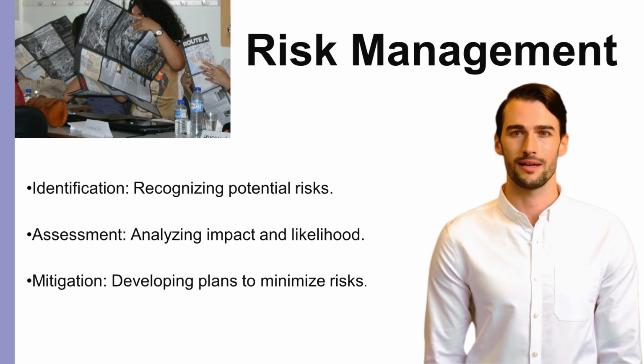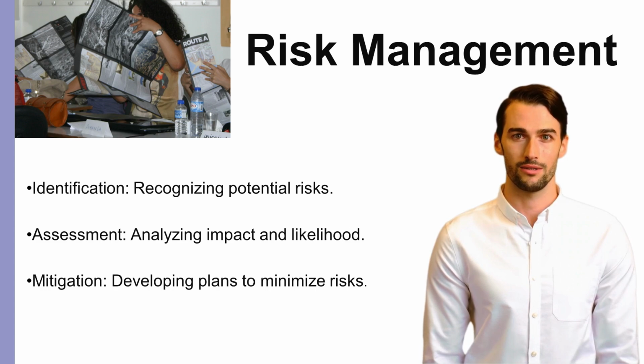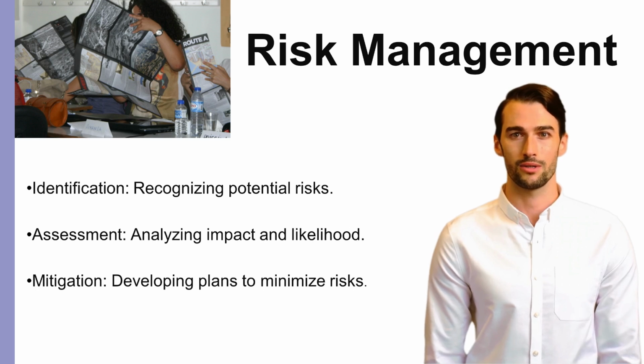Risk mitigation planning, project managers develop strategies to minimize risks. Strategies include avoiding, transferring, mitigating, or accepting risks based on the project's circumstances. Risk monitoring and control. Throughout the project, risks need to be monitored and controlled to ensure mitigation strategies are effective and new risks are addressed promptly. Regular risk reviews and updates to the risk register are important.